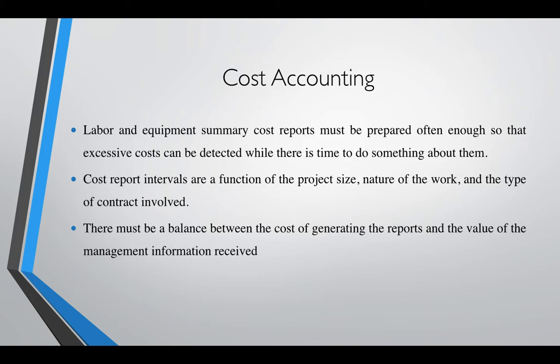So there are several different reasons for contractors to use cost control methods. Cost control can range from simple collection of cost of labor, material, equipment, subs organized in project or sub-projects to detailed compilation and analysis for every work activity. The overhead cost of cost control increases as the detailed collection and expected reporting detail increases.